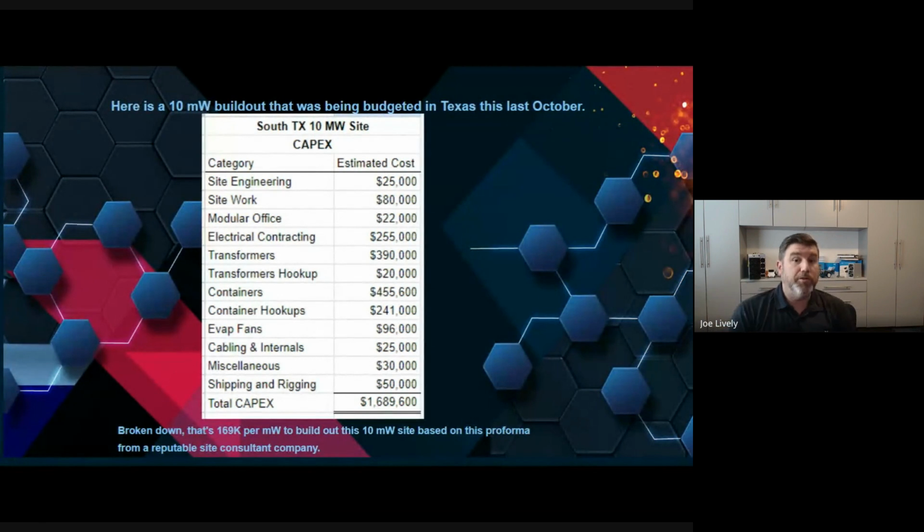And this is really factual. I talked to a guy back in Wisconsin a few weeks ago. He's building out his sites for $165,000 a megawatt. And it's a smaller site. It was 4 megawatts. But he was doing some very creative stuff, buying things from China and had some good deals with contractors. But the more you scale, the cheaper the cost per megawatt should be as part of that process. Alrighty, so that is kind of the overall concept on scaling and pricing.